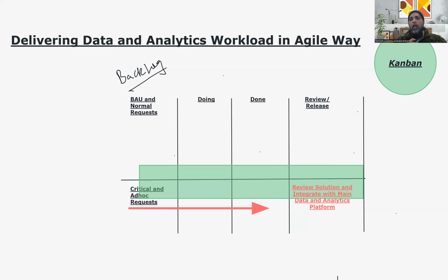Now, normally in the agile way, like I described before, we have the opportunity to call the business owners and have a collaborative session where they can provide their requests. Based on the resources we have in our team, we split the tickets, identify how much time it's going to take to cover those requests, and then we put it back to the business owner.